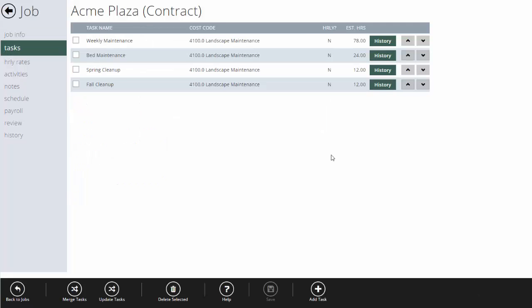The key to time tracking is your tasks. Tasks set up how you want the crews to clock in. When the crews arrive at this job and clock in, it's going to give them the choice of these four tasks and ask what they're working on. They'll pick one and start to work — and that's how you're going to track your estimated versus actual hours.